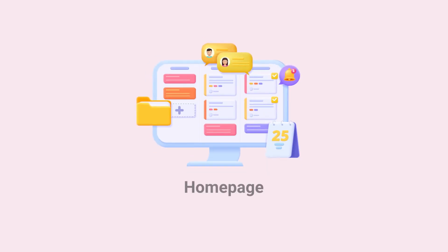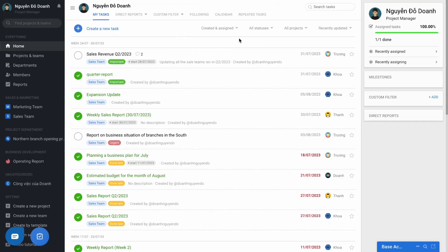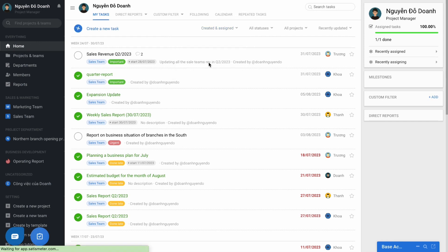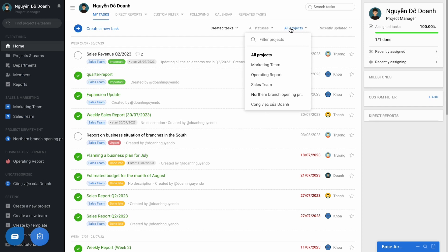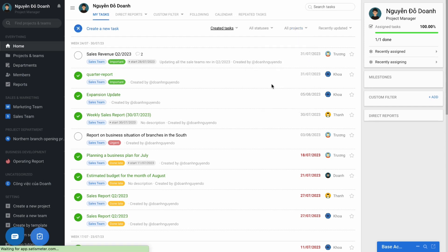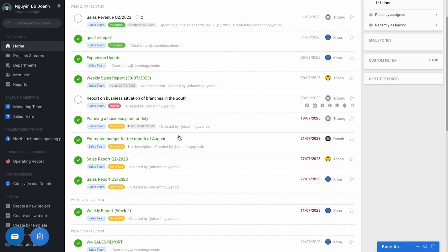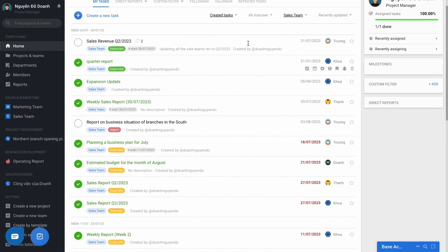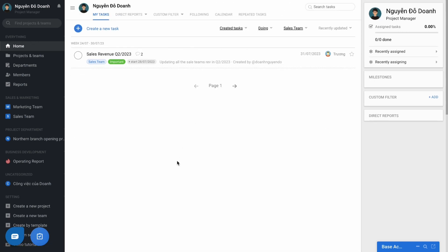And the next one is the home page. And finally, to have an overview of all the work that you have assigned on the software in general, the designer can reach the home page using the filter created tasks, combine with the filter with the specific project or team or all on the software, and filter the status you want to reach.